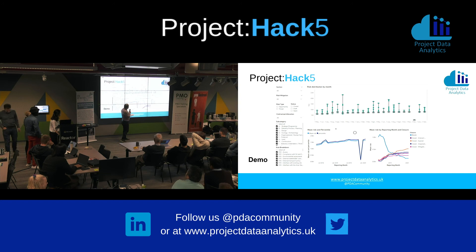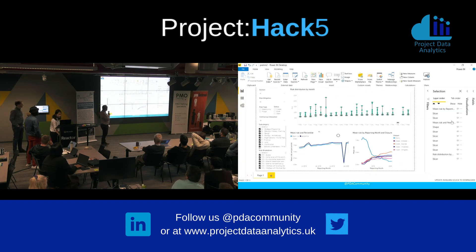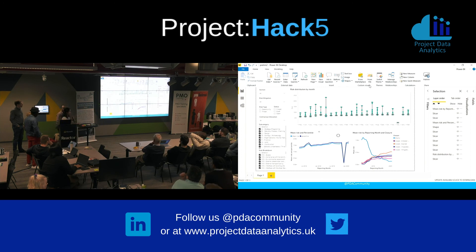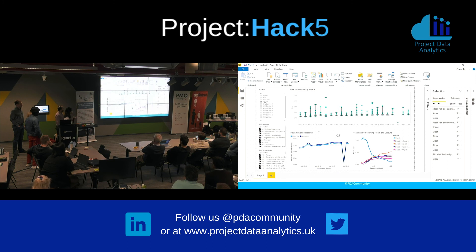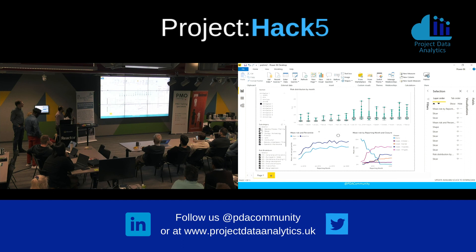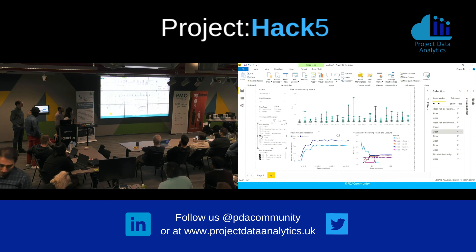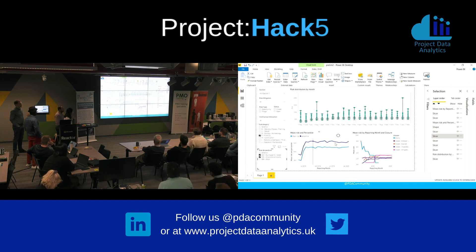You can see there is a drop — that drop is caused because we don't have data in that period. This is an extension of what was done in previous years. Previously it was only a combination, a total of around 60,000 components of risk. Here we break it down into categories, and the section of the road. If there's a specific category you want to examine, you can see what the risk is for that specific one. You can also adjust whether you want a contingency fund at 80%, 70%, or perhaps 90%.